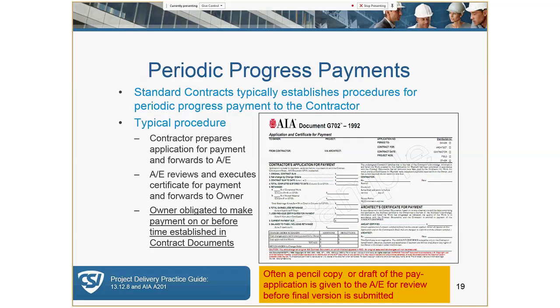And keep in mind that based upon the funding mechanisms, there could be several entities who want to see the pay applications every month. So it may be more than 6 or 7 copies. Yeah. So double checking the math is very important. One mistake in the process, and you're going to have to start all over. So it's a good idea to do a quick math check and make sure that all the values in the line items at least add up.